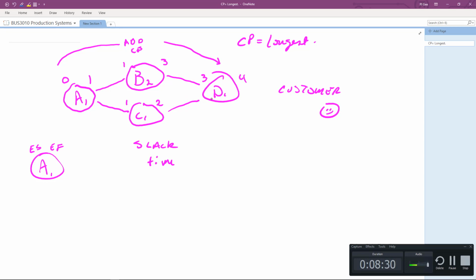We know what the critical path is, and that the only place that there's slack time in this entire network is C. By logic, because it takes 1 week, we could probably start this at week 2 and finish on 3 and be fine. We're finishing right alongside B, which takes two weeks to do. So that's where the policy comes in. Why would we start early or why would we start late? But let's finish the analysis.